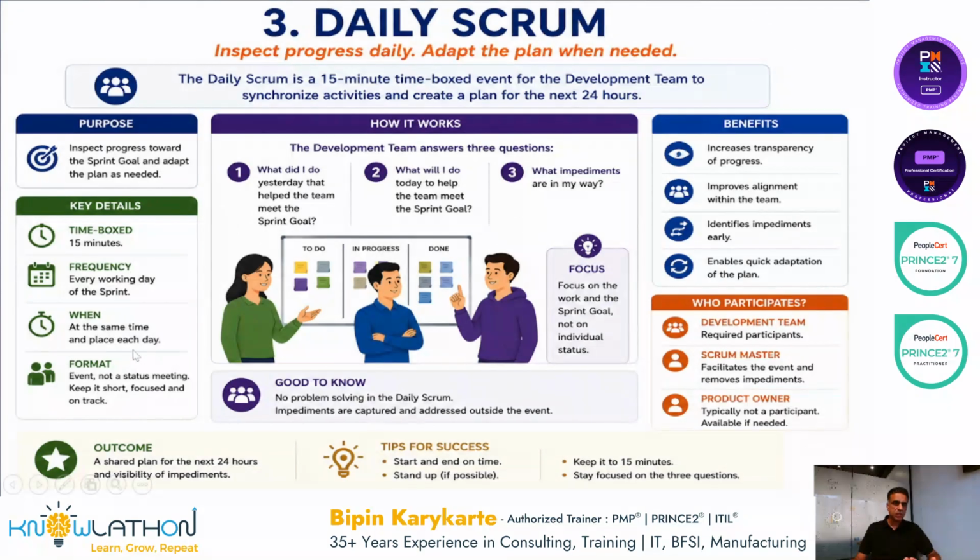How it works, key details: time boxed, frequency is every working day of the sprint, at the same time and place each day, and the format is an event and not a status meeting. Keep it short, focused, and on track. Generally, it is done standing up. People will not sit around. They will just stand up, have a 15 minute quick discussion, and that's it.